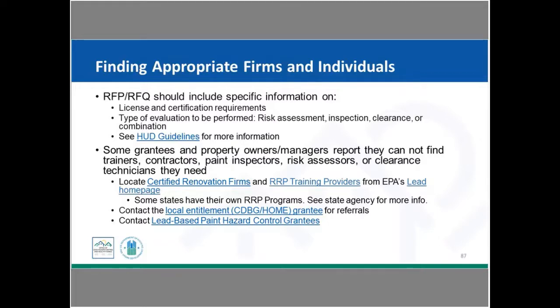And so what we've provided here on this page are links, and we'll show you some screenshots of those, to be able to locate what certified renovation firms were in your area, also where there was training available. And so in some cases, and I think Chris mentioned this a little bit, what you'd be working towards would be getting your contractors that are doing the general rehabilitation for your program to get the training and become certified renovation firms so that they could complete not only the lead hazard reduction work, but also the same contractor would be able to do the renovation itself.